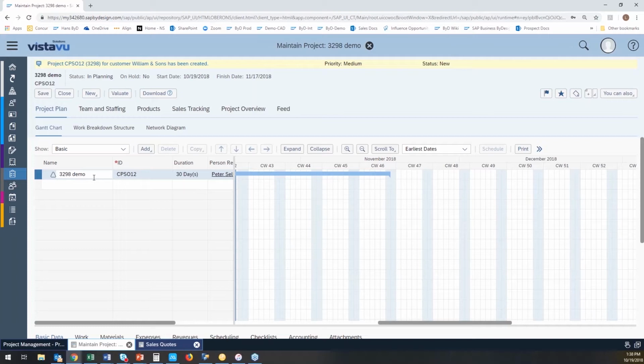If, for example, you start doing a lot of work on that project, maybe scoping or pre-sales work, or you're out in the field doing some analysis, and you want to accumulate those costs but you don't have an order in hand, we can create the project in advance, so you can always keep track of that and then relate it back to the sales order once that PO from the customer does come in.